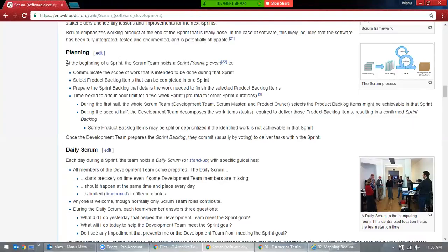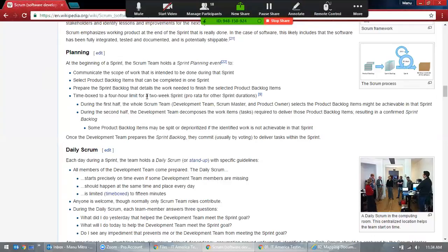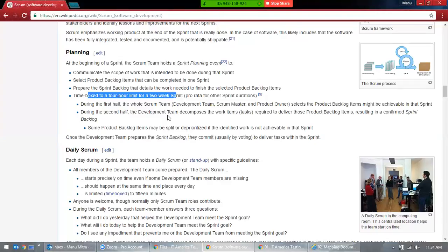Here you have this sprint plan. They'll discuss all about the user stories: what we have to complete and how much work should be completed. It takes 4 to 5 hours, time boxed. They'll make sure it runs through your lunch time, starting from 10 a.m. and ending around 3 p.m. It's a complete planning day, one day for every month, so you'll have one plan.